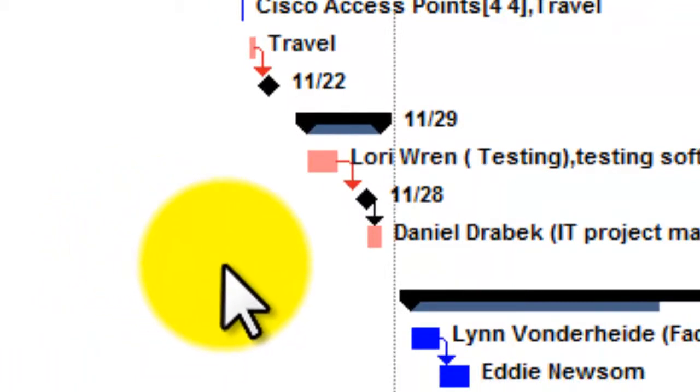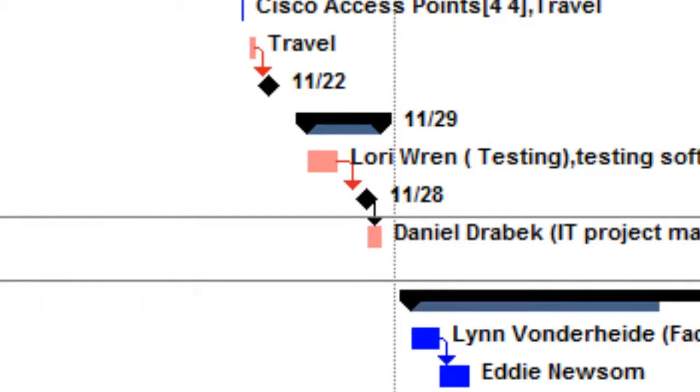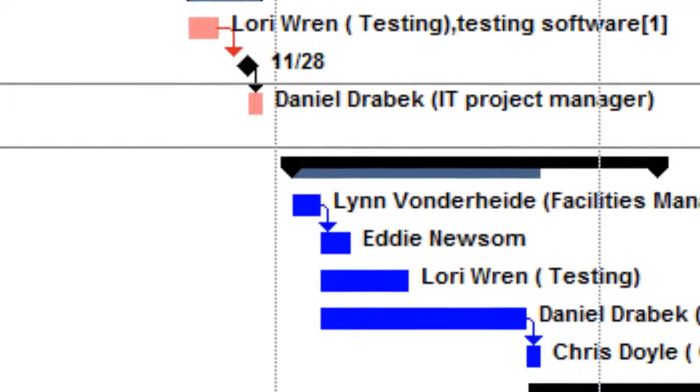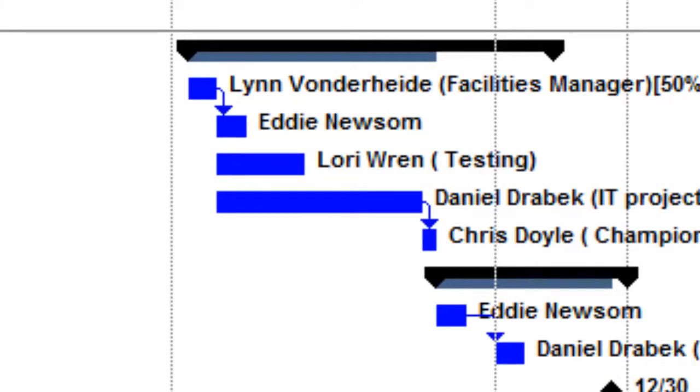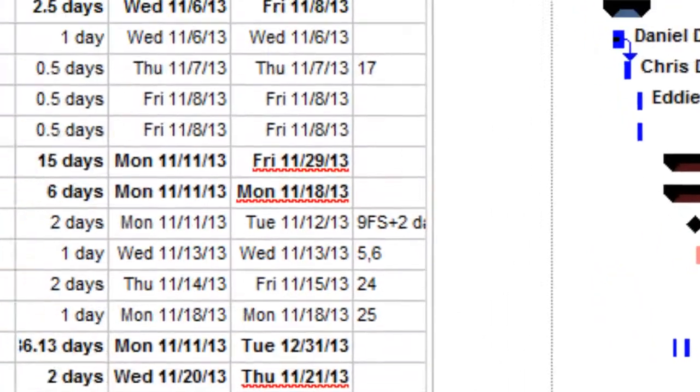So you'll notice that each one of these, send out results by conference call and email, is part of the critical path. But you'll notice also that none of the monitoring and controlling functions are part of the critical path, as that should be. The other thing mentioned in the definition was the network diagram.